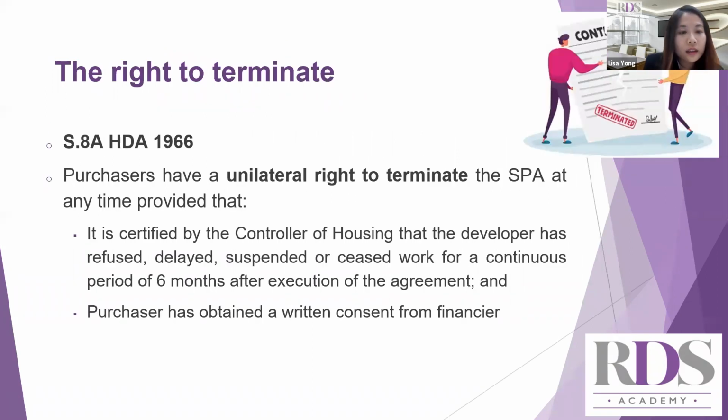Next, on the right to terminate. The purchasers actually have a unilateral right to terminate the SPA. Pursuant to Section 8A of the HDA Act, a purchaser is entitled to terminate the SPA if the licensed housing developer refuses to carry out or delay or suspend or cease work for a continuous period of 6 months or more after the execution of the sale and purchase agreement, in which it has also been certified by the controller and has obtained a written consent from the end financier.